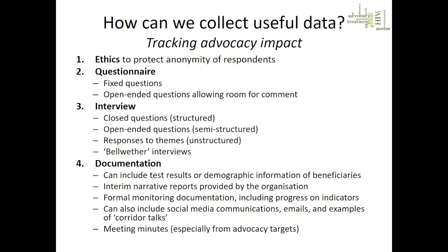It could be emails. As an M&E person, I would always recommend that people keep emails in a separate file, especially emails relating to advocacy processes, because after a couple of years you can open the file and see the activities that have gone on using emails regarding advocacy. And also corridor talks. Catching somebody in the corridors of the government, or in the corridors of a donor, or some organisation, noting it down, so that when you come back to it 6 months later, you can say, yes, that conversation led to this, led to that. And meeting minutes as well.